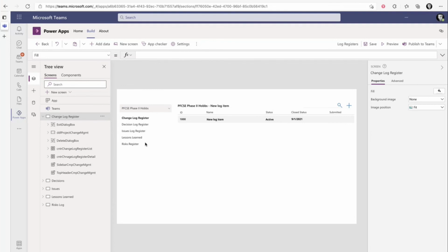In the past, we would literally keep track of a lot of these things in spreadsheets. And I can tell you with authority that in one of our clients right now, in construction, they have to keep track of what are known as RFIs, requests for information. This is not a procurement term in this situation. This is a request for information to clarify a construction activity. Well, they have to keep track of these things. These RFIs are landing in 4 different tracking tools at the moment, at least 4.